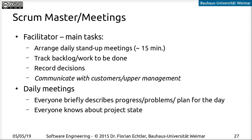Another important job of the Scrum master is to arrange daily standup meetings, where everybody briefly describes what they want to do for the day and everyone knows what the others are doing too. So if somebody is stuck on something and mentions it in the standup — even if it's just one sentence — then somebody else can chime in and tell them if they already know the solution. A lot of things can get solved much more quickly that way.